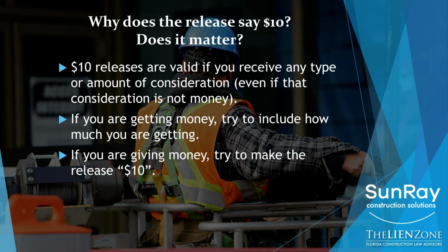If you're getting money, however, if I'm a sub and I'm expecting a check from the contractor, let's say it's $25,000, I would like my release to say $25,000, not $10. If I'm a contractor, if I'm giving money and getting a release, I would always like it to say $10.